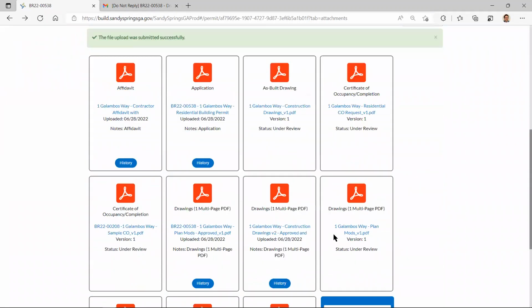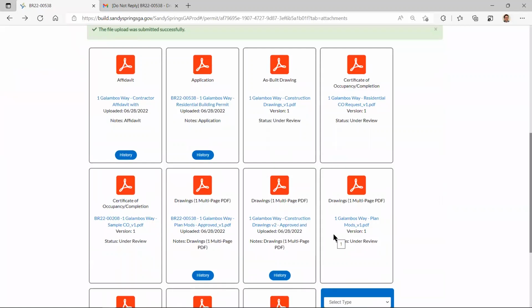Another item for the as-builts, again, if your project requires a water quality device, just make sure it's on there. It has to have a GPS location. There's actually a certification statement that the surveyor puts on there. Once the as-built comes into play, we will respond to what's outstanding or missing on that document. And we have some of our previous seminars. If you go to the seminars page, we have some information about the as-built, what's required to be on it, and also site plans.